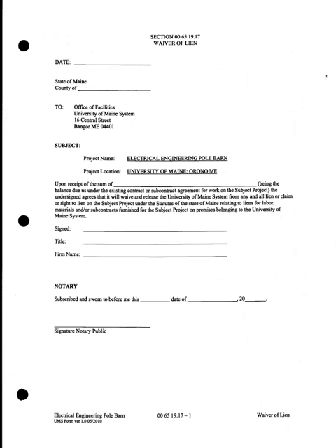So we need to make sure that the subcontractors have signed a release of lien that says that they either have been paid or that upon payment they will release any liens, so we can make sure that it's correct. This sometimes becomes difficult because the contractor hasn't been paid by us in order to pay their subcontractors.